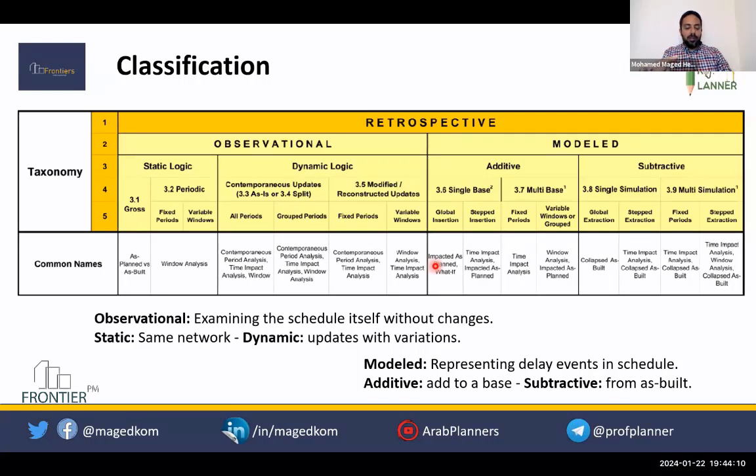The contractor can claim for the actual additional cost it incurred in this time, so they can claim this compensation. At the same time, after you resume the work and complete the project, if the contractor is delayed at the end, beyond the extension of time, the contractor will also be subject to LDs, liquidated damages.